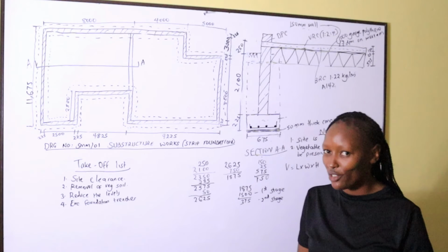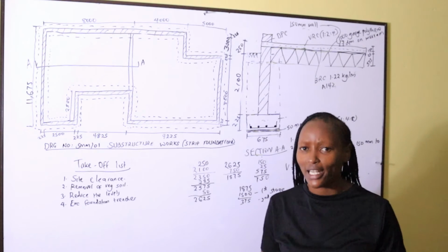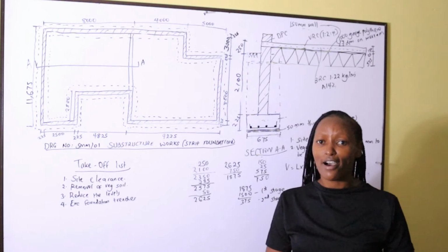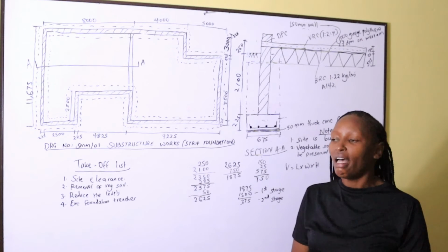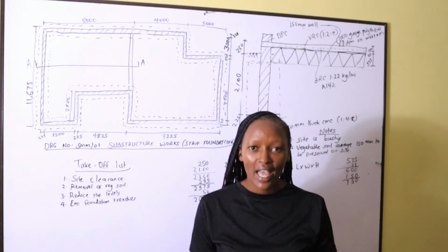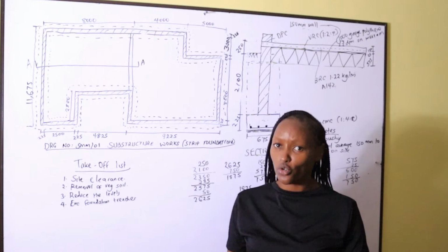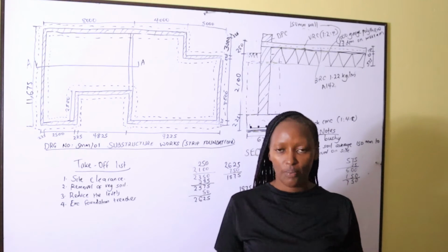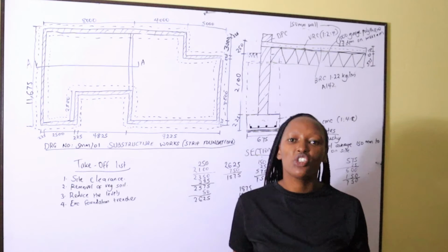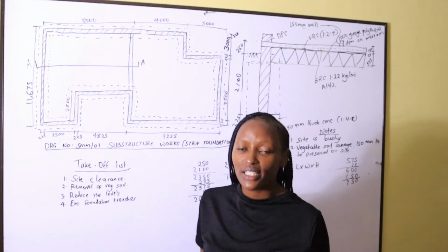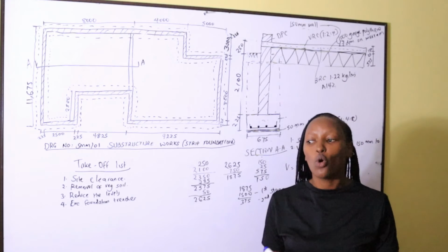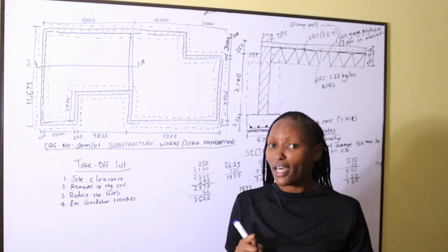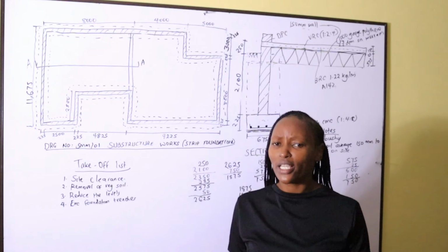Okay, I don't want to tell you to write an item. I want to explain to you what is an item first. Item, you shall find it in our takeoffs, and item is usually there to symbolize that whatever we are supposed to measure cannot be measured accurately from the drawing. So a provisional sum will be given in a bill of quantity. A provisional sum means it's a sum of money that may change. So a provisional sum will be given to all items in the takeoff when we come to transferring to the bill of quantity, so that that money is allocated temporarily.